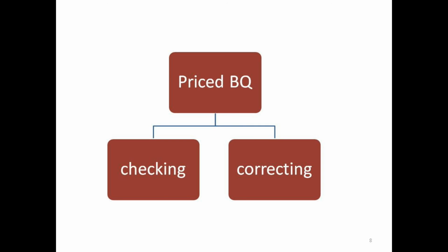Is it arithmetically correct? So is it added up correctly? Are the extensions and those types of calculations done? Is there any imbalance between rates as well? And in the priced bill, is there any large error discovered in the proportion of the cost of the job that may influence the builder to withdraw from the tender?